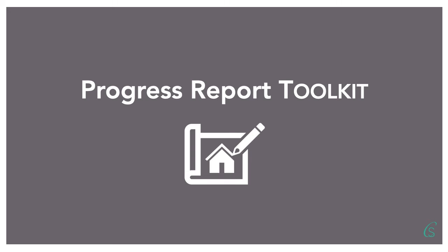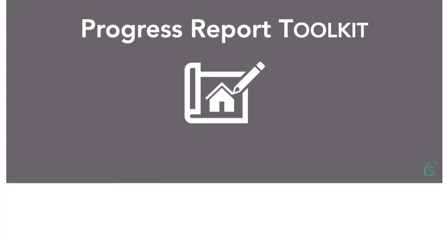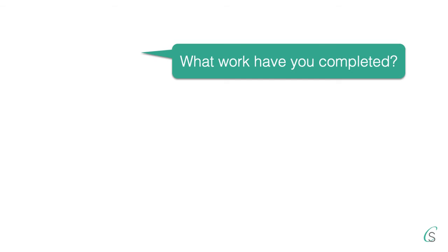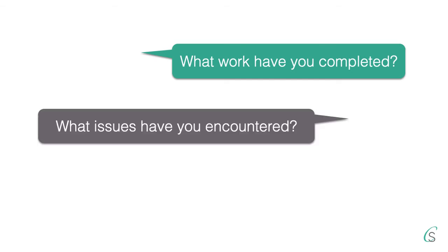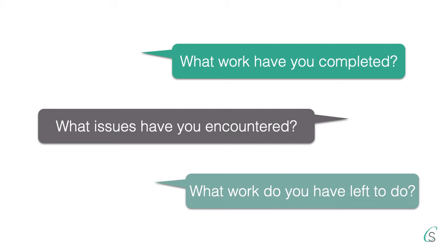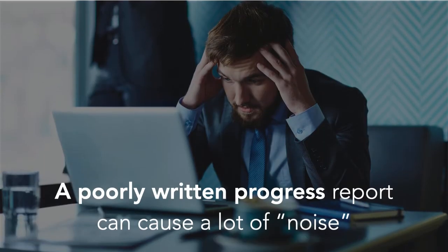A progress report, sometimes called a status report, should enable the audience to quickly get answers to three questions. Question 1, what work have you completed? Question 2, what issues have you encountered? And question 3, what work do you have left to do? Sounds pretty straightforward, doesn't it?